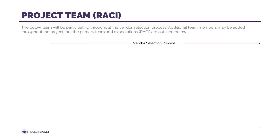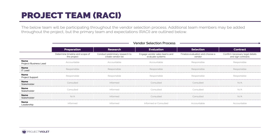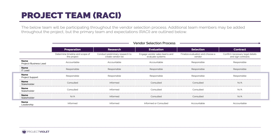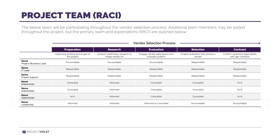One way to define the team and make sure everyone's on the same page is using a project RACI. For the most part, you should have a project lead — usually the people ops or business lead — someone that understands the operational processes really well. Depending on how big your company is, it'll make sense to have a partner IT lead. From there, identify project support and key stakeholders to consult and keep informed. You may also need to formally assign someone from leadership that will be ultimately accountable, own the decision, and sign the contract.